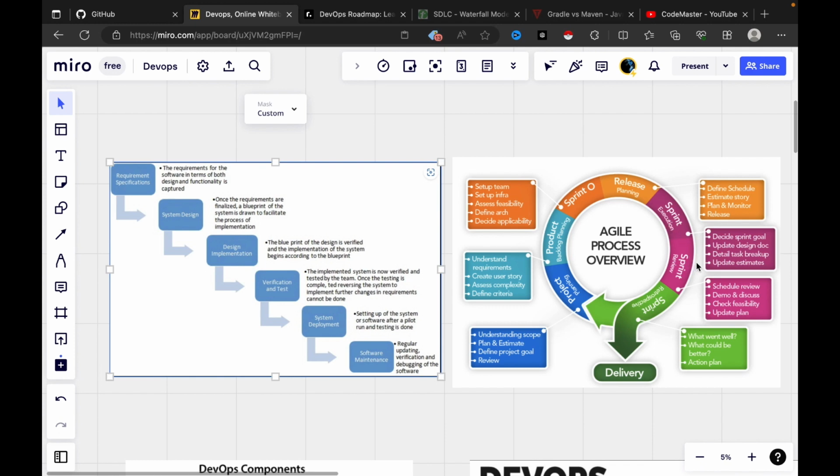At the end of the sprint, we show what we have done to the people who asked for it. They give us feedback and tell us if we need to change anything. And we have a retrospective. We have a team meeting to talk about what went well and what didn't. We try to learn from our mistakes so we can do better next time. And it goes on. It's like a cycle process.